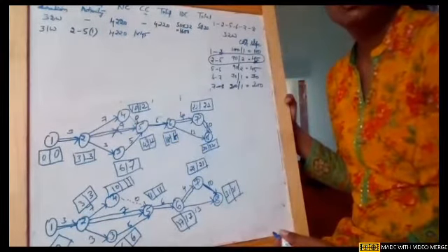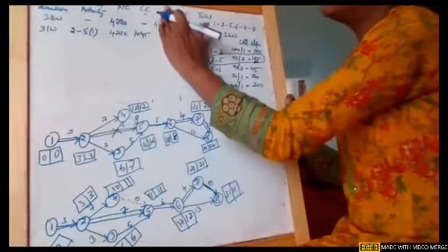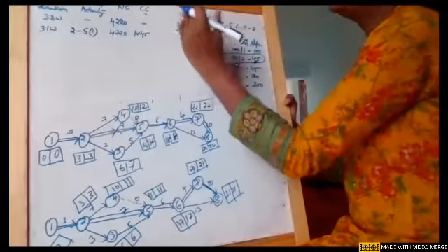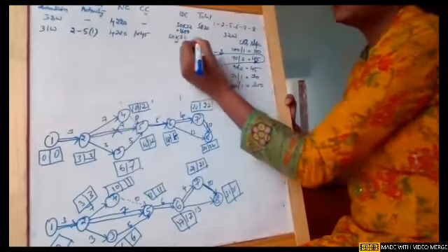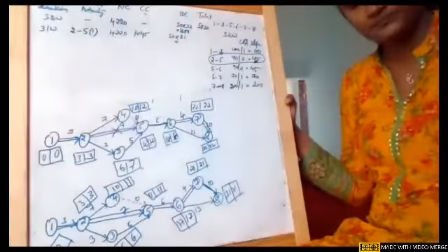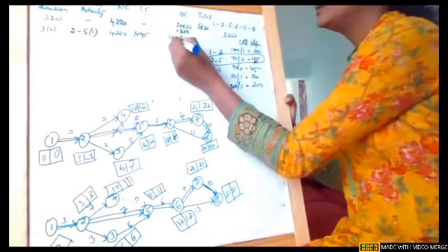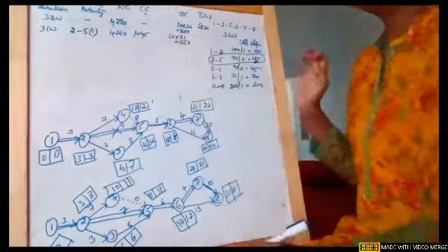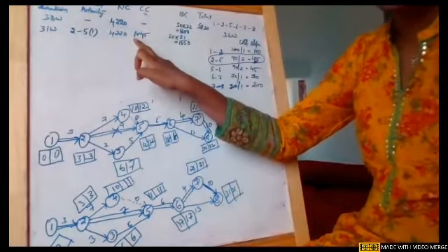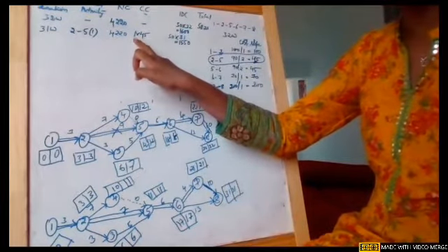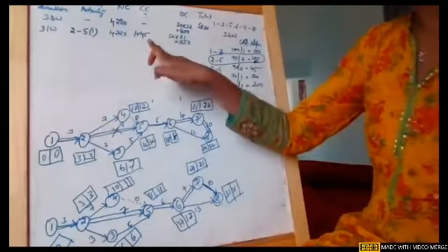I'm just ignoring this total. And the indirect cost is 50 into 31 weeks, which gives you 1550. So when there is crashing, by how many weeks it is being crashed? As per our current network, it is by 1 week. 1 week into the cost slope of 45.